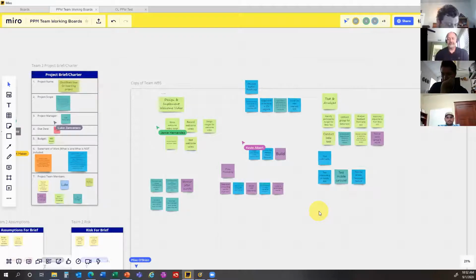Again, this is the first time you guys are going through this, so I know this is what you're learning right now. But have a post-it that says planning, and under that you're going to have everything related to creating the plan: the project brief, the work breakdown structure, the schedule. The schedule equates to the timeline, and then the communication with your sponsor or getting buy-off from whoever the customer is. All that should be part of the overall plan. Got it. That makes sense.